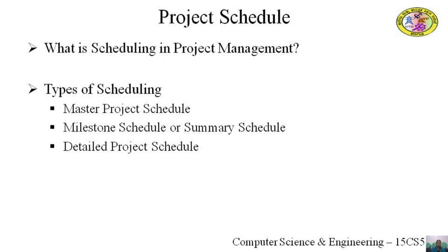When choosing scheduling software, it is important to look for scheduling tools that allow you to create different views from the same schedule. If you create a detailed schedule with milestones as a Gantt chart, make sure it can be summarized up to that level for a simpler view that can be easily shared with the team or the stakeholders. This gives the ability to present the same schedule in different formats depending on the level of detail required and the target audience.